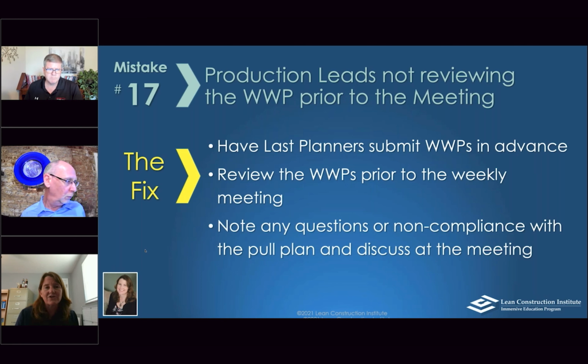And then the leadership team needs to be reviewing that and coming up with questions. Hey, according to the pull plan, you're not supposed to be doing this activity for another 4 weeks. And this activity that you don't have up here, you are supposed to be doing right about now. Why is that switched? Or, hey, have you noticed that you look like you guys have a conflict here? Taking the time to put those questions together so that once you get into the meeting, that's what I said, the leadership team, they're the facilitators. They're the ones guiding the process. They're the ones trying to pull the information out and create that engagement. So that takes preparation. You can't just go in blind.